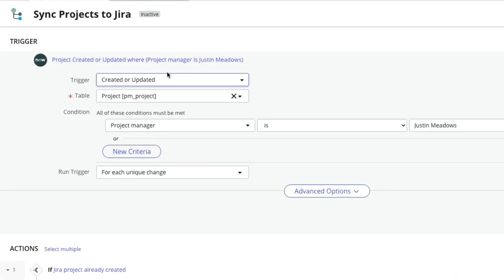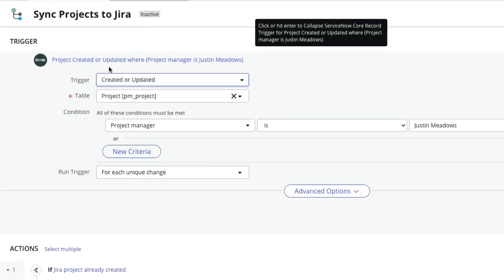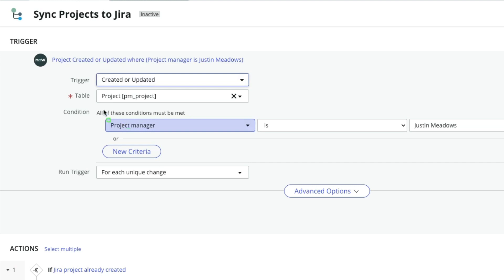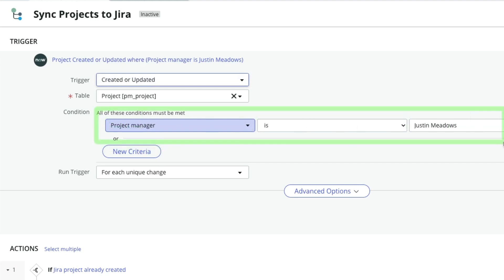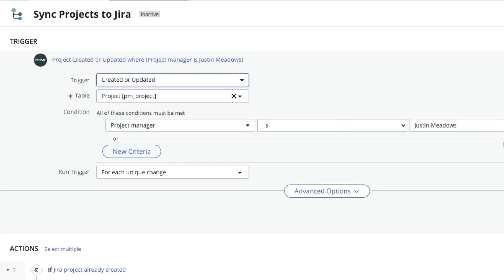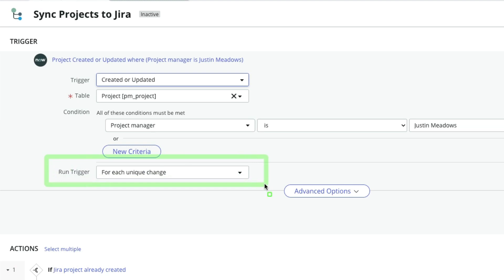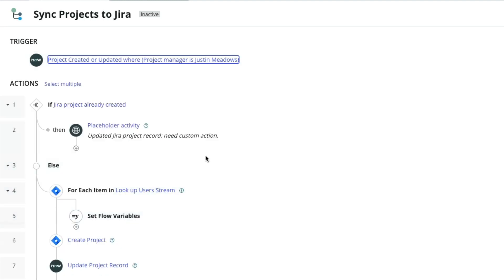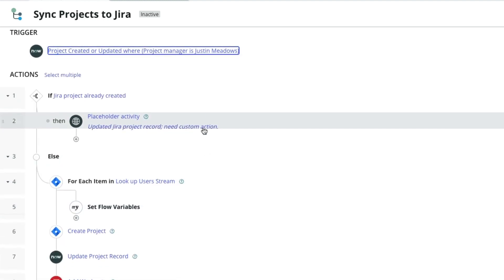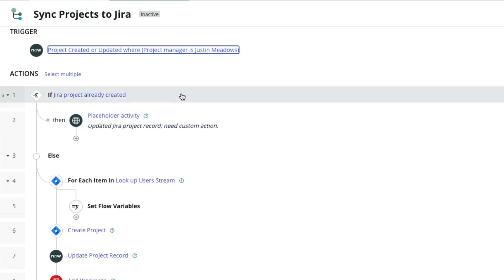First I have the trigger: when a project is created or updated. Then I have a filter — I'm filtering on whether the project manager is Justin Meadows, that's me. I want to do it for each unique change, because the use case is there might be updates to a project and we need to update that information in JIRA. So I want every unique change — including an update or a create — to go over. Then the first thing is: if a JIRA project is already created, how do we know?